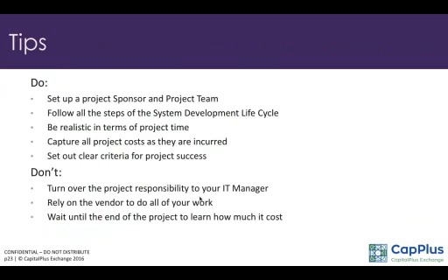You need to capture all project costs. Sometimes it's difficult to visualize, so you need to put in a contingency budget to ensure that you cover some of these costs. You need to set up clear criteria for project success, and also monitor risk.